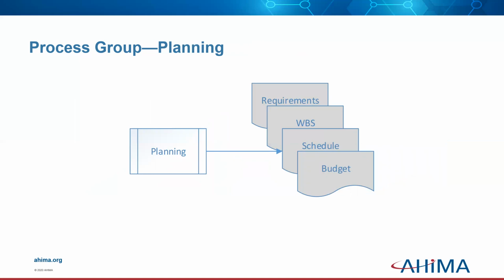So the next phase is planning. So once the initiation is complete, the planning process begins. This phase uses the completed project charter and several planning tools as input and produces a detailed project plan and updated project constraints as the output for the project planning process. The purpose of this process is to investigate the project further to gain a complete understanding of the project and the work to be completed in order to establish a detailed plan to execute it. The initial project constraints of scope, schedule, and budget from the project charter were educated guesses and must be better defined as the work is planned.